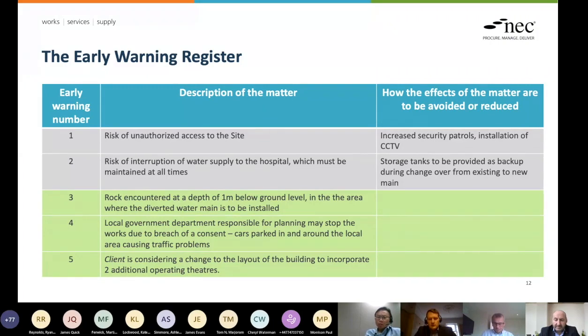Hayman's involvement is not direct to the contract and he's been reimbursed under his professional services contract, his PSC. Bringing in someone from the local authority, for example, the client might have to make arrangements to do that, but hopefully you can almost do it as goodwill, certainly in the first instance.